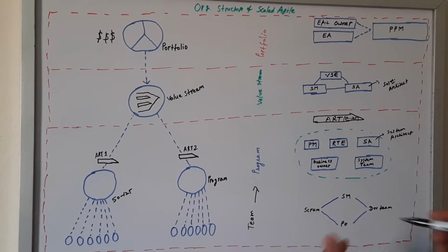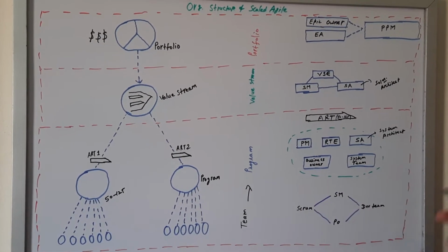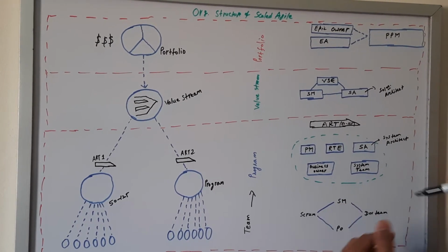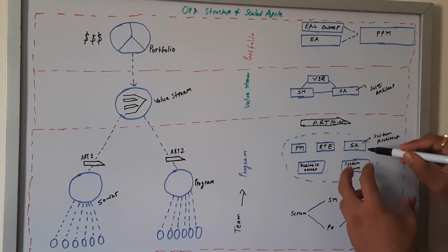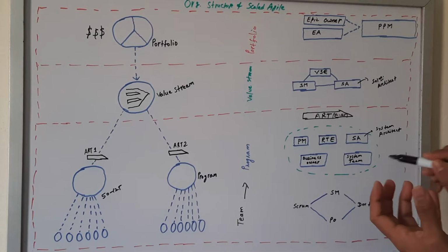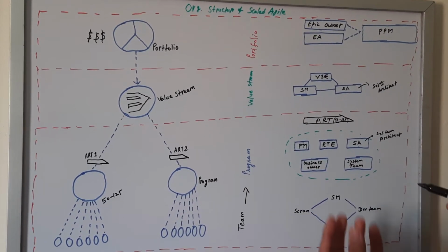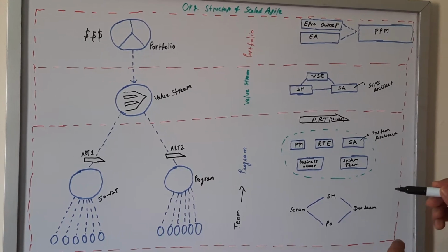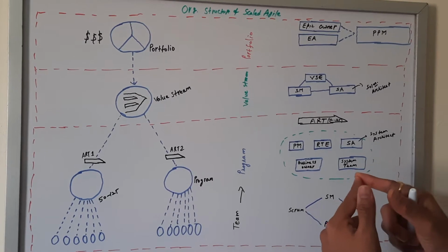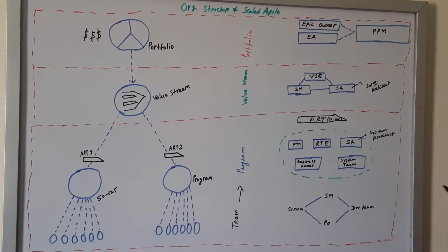What they will do is just the impact assessment of the different systems developed by the small teams. For example, at the team level you may have 10 different teams, and all the teams have designed subsystems. Integrating all these systems, they will do the architectural impact assessment. Now the System Team. What will the System Team do? As I said, at the team level each team will provide some deliverable. The System Team will integrate those deliverables, and after integration, they will provide a solution.